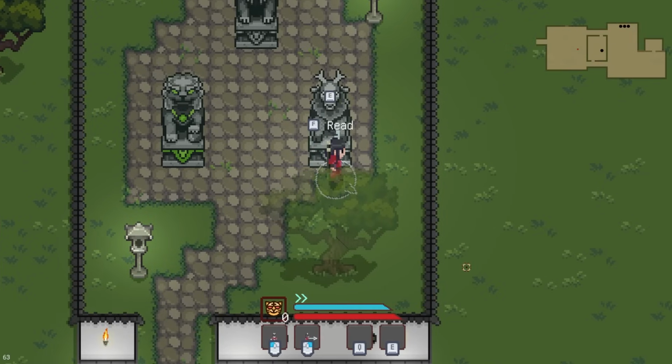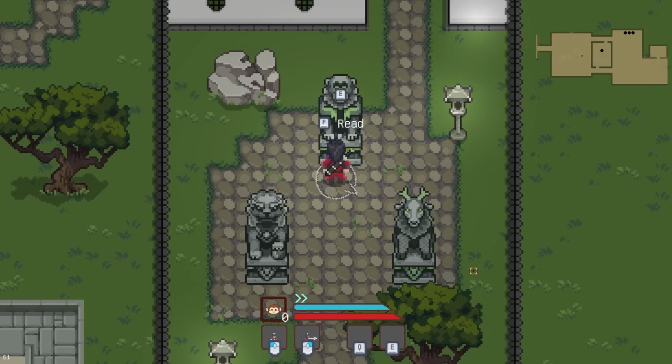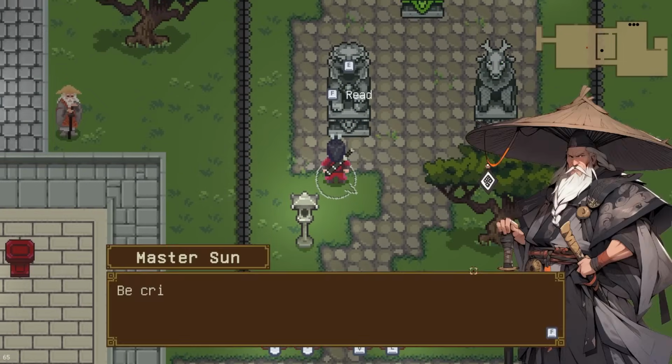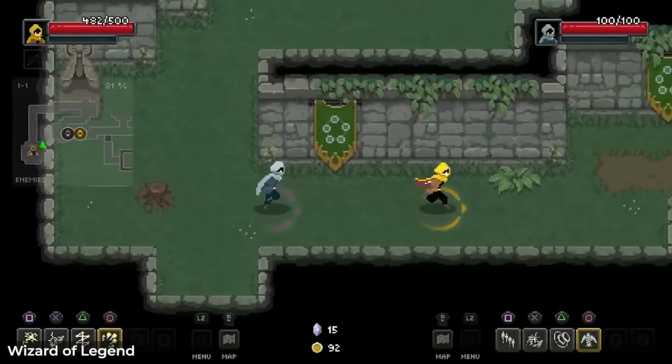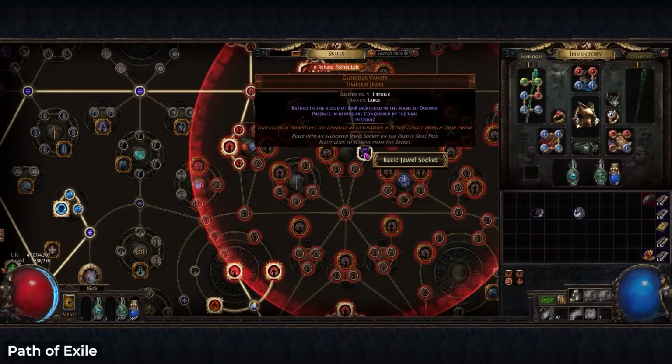So for Songs of Everjade, one of the things we put on our anti-feature list is we're not doing a shop system and an economy system. It's something that we could implement, but it would be massive scope creep, and in the end, it isn't part of the original vision we have of the game. So have some points on your anti-feature list. Some other examples could be things like multiplayer, or could be like an RPG leveling system, or could be modding support.